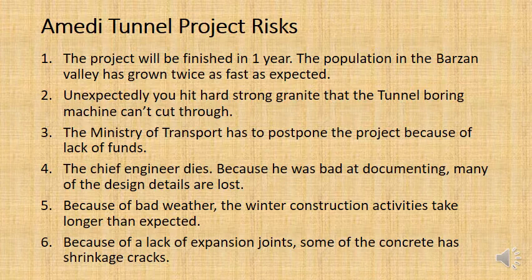Now, number 5, if there's bad weather in the winter, because it gets very snowy in that part of the KRG, when things are snowy and cold, basically people are not going to be working quite as long hours during the day. They're going to be working slower. And so the construction activities take a lot longer than expected. So there's going to be time delays, which will lead to cost overruns and other things.